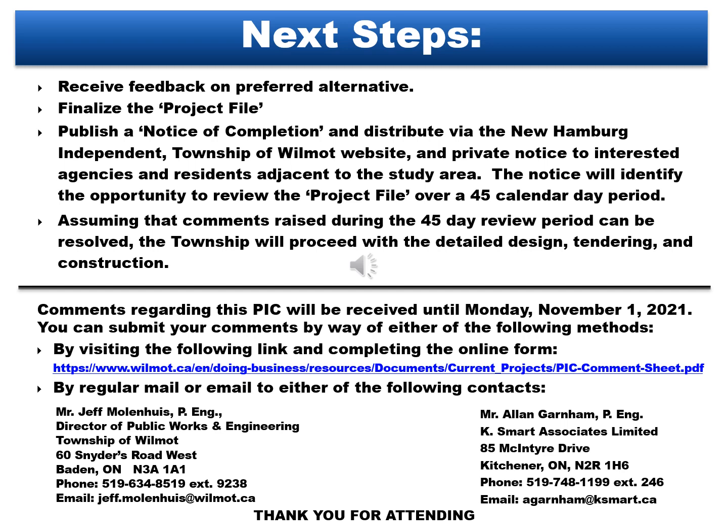Next steps: receive feedback on the preferred alternative; finalize the project file; publish a notice of completion and distribute via the New Hamburg Independent, Township of Wilmot website, and private notice to interested agencies and residents adjacent to the study area. The notice will identify the opportunity to review the project file over a 45 calendar day period. Assuming comments raised during the 45-day review period can be resolved, the Township will proceed with detailed design, tendering, and construction. Comments regarding this PIC will be received until Monday, November 1, 2021.